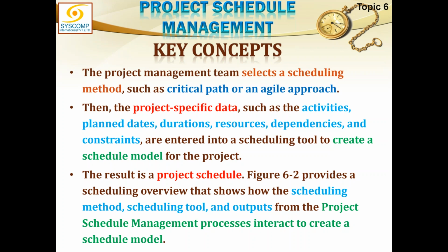One is the raw data, when it was not converted to the form of a schedule model, and then there is the schedule model, which is the finished data, but this is one shape of the finished data. So we can have many shapes of the finished data, and ultimately it will keep evolving during planning, and finally, when we are satisfied that whatever could have impacted the schedule has impacted, then we can finalize the schedule, and we can get it approved by the boss, the sponsor.